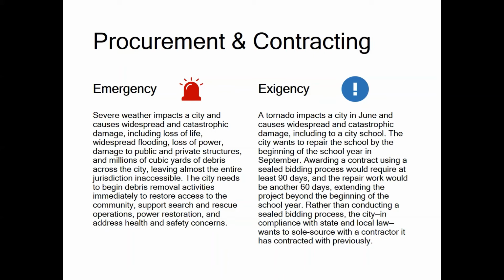Here, the city can demonstrate that this is an exigent circumstance because the sealed bidding process would cause an unacceptable delay, adversely impacting children's education and the city's economy if parents are required to stay at home with children. Thus, procurement by non-competitive methods was necessary. Once, however, the emergency or exigent situation has been resolved, FEMA expects the remainder of the work to be competitively procured. As we discussed earlier, it is extremely important to note that a procurement misstep can jeopardize your PA funding. If you're unsure if your situation meets the definition of emergency or exigent, we strongly encourage you to reach out to your FEMA or state representative for guidance.